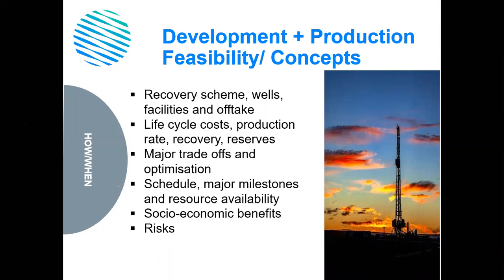So in the case of the development, you may want to mention in your business case the recovery scheme that you plan, the number of wells, what facilities are going to be built, and what offtake arrangements have been put in place to get the hydrocarbons to the marketplace. And then you will build up a full life cycle cost estimate along with an estimate of production rate and recovery rate and reserves that will allow you to do the economics for the whole project.